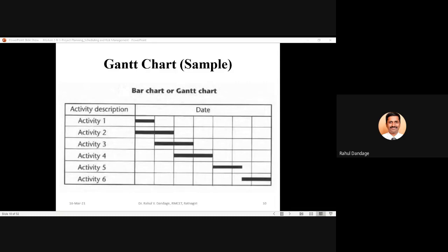So we can assume that from day 1 up to date 14, the entire 2 weeks will be consumed by activity 2, and activity 2 will run parallel to activity 1 in the first week, because activity 1 does not continue in the second week.